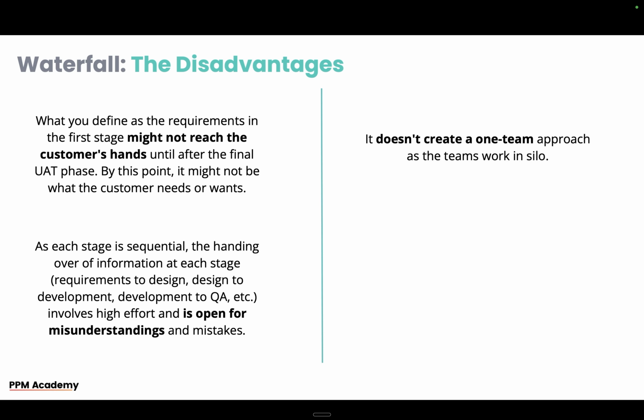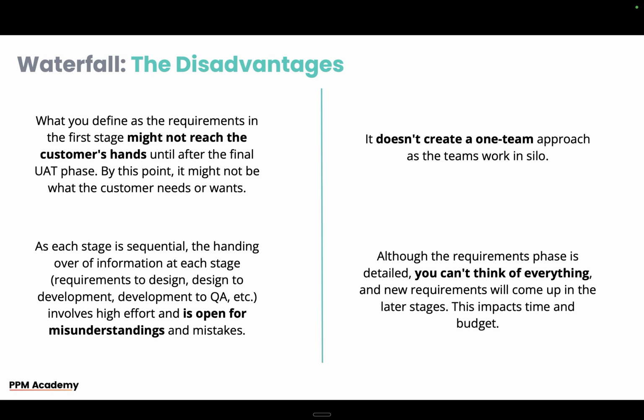And like, no, that means this. And you're like, and it just becomes chaos. And although the requirements phase is detailed, you just cannot think of everything. And new requirements will come up in the later stages. And this impacts time, budgets, and you've got lots of change requests as you go through the project.